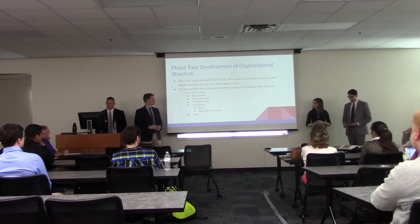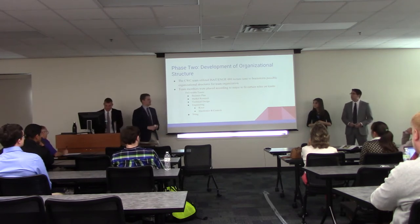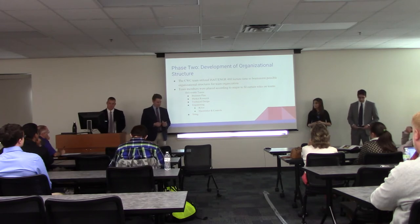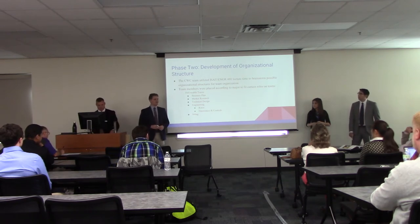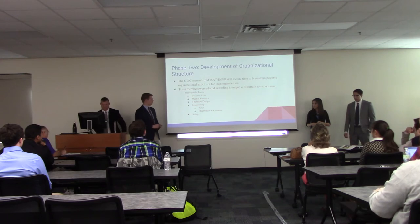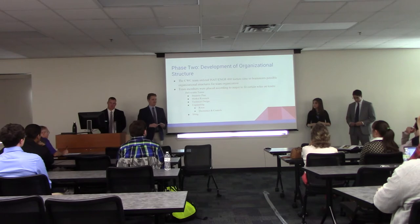But first, the team needed to create and agree upon an organizational structure. The PMO used the beginning of several ISAT Engineering 480 courses to discuss the team's organizational structure and to get feedback from the class about general structure and team roles. And the final team structure was decided a few weeks before the end of the fall semester. The team was split into two main categories, the deliverable teams and support teams. A deliverable team is a team whose duties are specifically related to a deliverable taken directly from the rules and regulations document.